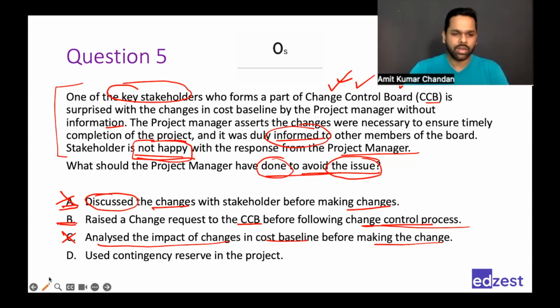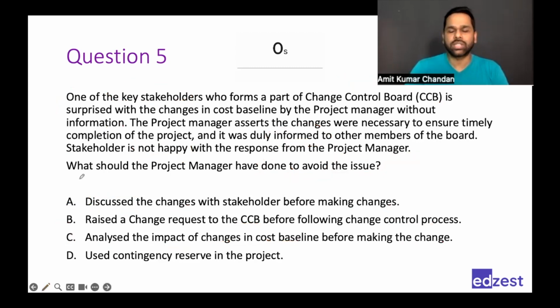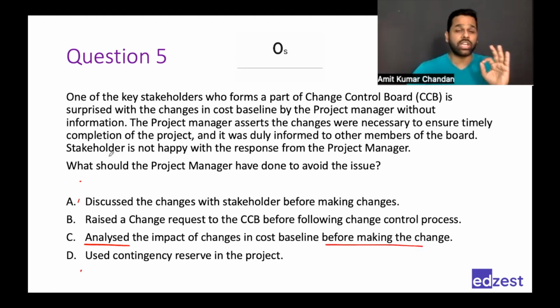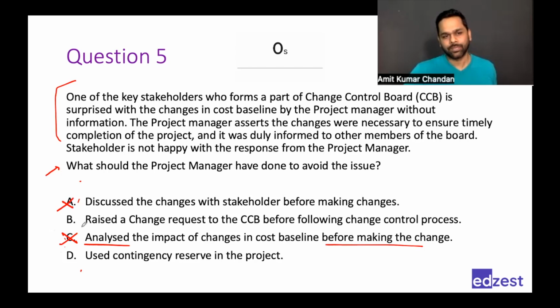Now, do you remember why I said in the first question, when we were discussing, that don't just look at the options and pick up an option? Analyze the impact of changes in cost baseline before making the change is a very true statement, which is correct in general. But for this scenario, this is not a good choice. Raising a change request is better.